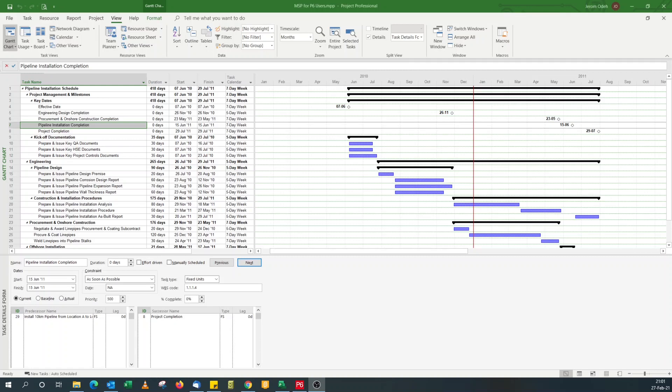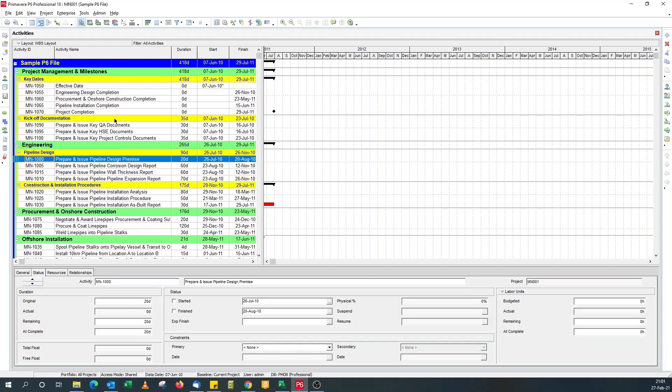For the first video we're going to look at how to display activity IDs in Microsoft Project. By default Microsoft Project shows line numbers while by default P6 shows activity IDs which are unique alphanumeric IDs.